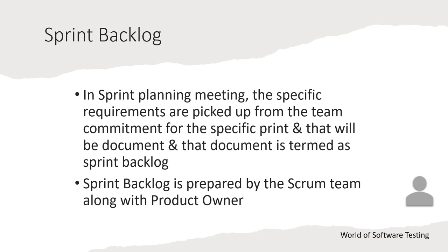Those picked requirements are documented in a document called the sprint backlog, which contains the specific requirements for the upcoming sprint. This is decided by the scrum team based on their commitment. The scrum team picks requirements for the particular sprint based on an estimation process that happens during the sprint planning meeting, and certain requirements are then frozen for that sprint.